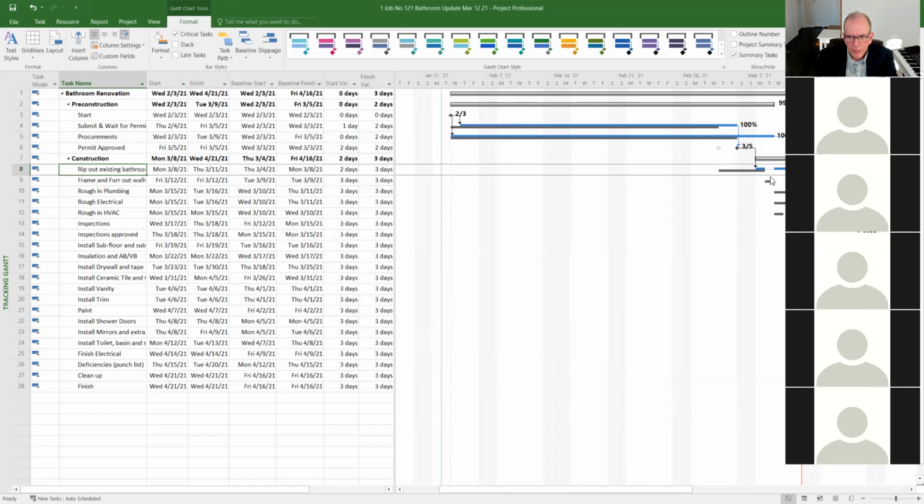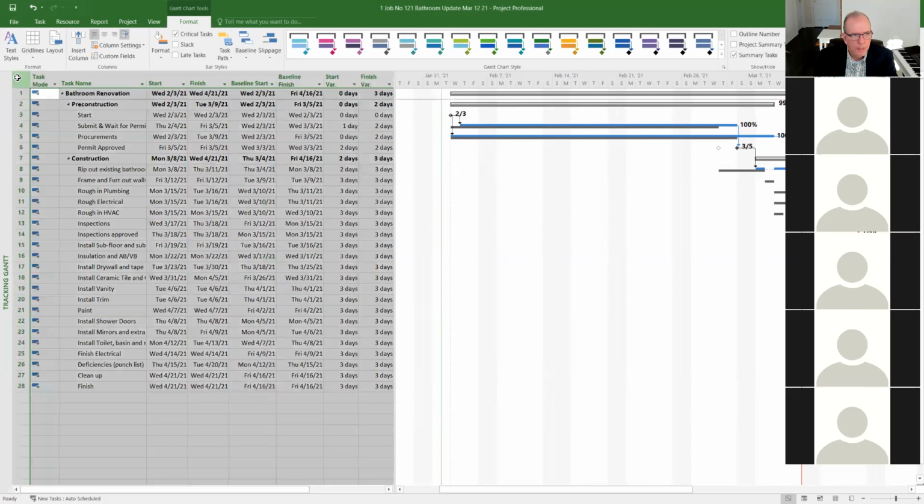I don't think I need to do that for everything to show you, but you get the idea, right? So I would say this, you know, this is our own forces, the carpenters. Why did we wait a day? I would explain that. So that would take us from the 2 to 3 days. And then the rest is just things pushing off, right? So that's where our variances are. I would continue to put those notes in, and then I would also check my costs.